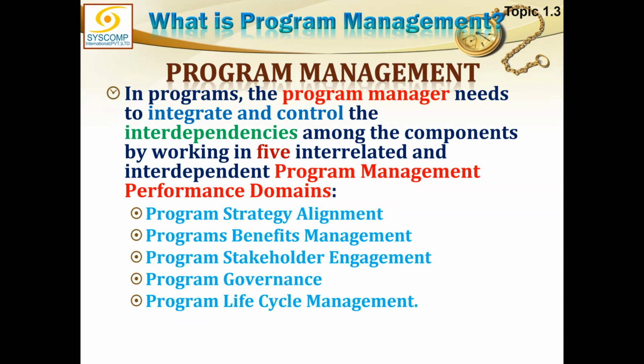Some of the components can work in parallel, while other components may require a sequence because the output of one component might be the input to the other component. Therefore, you have to be very careful in designing the start and end of this component, as I said earlier, and that would also affect the benefit cycle.